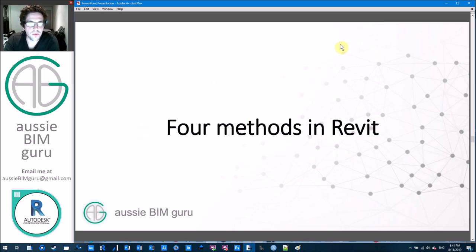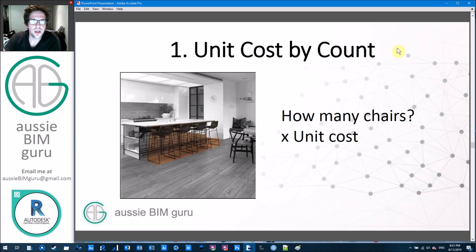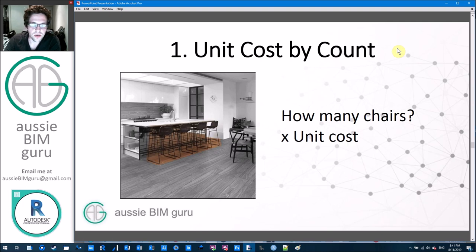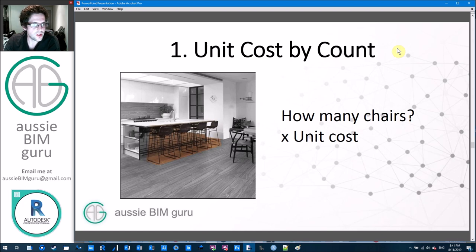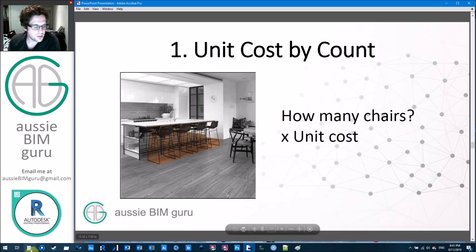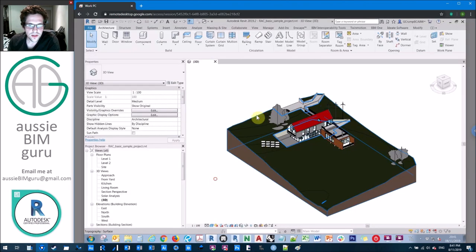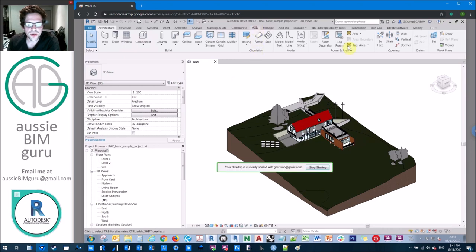So four methods I'm going to cover in Revit. The first one is what I call unit cost by count. Imagine you just want to figure out how many chairs you have times their cost — it's very simple. You're just setting up a basic formula to find the total cost. Let's jump into Revit and into the basic sample project and generate a schedule for all the furniture in the model.